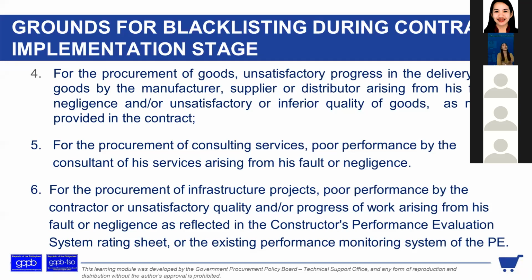While the time for delivery has not yet arrived, they can deliver and withdraw some of their items, no? Anytime. Basta ang importante at the time, yung deadline talaga ng delivery, satisfactory yung quality ng goods na i-deliver sa inyo based sa specs nyo. Yun lang talaga. I-determine nyo yan kung may delay siya or may hindi niya na-meet yung performance obligation niya